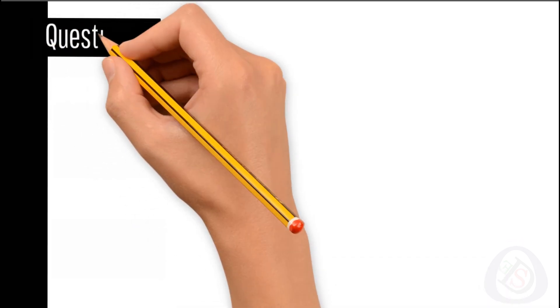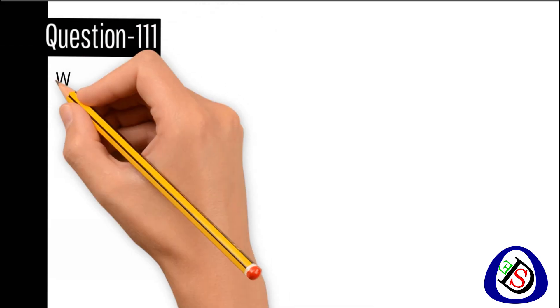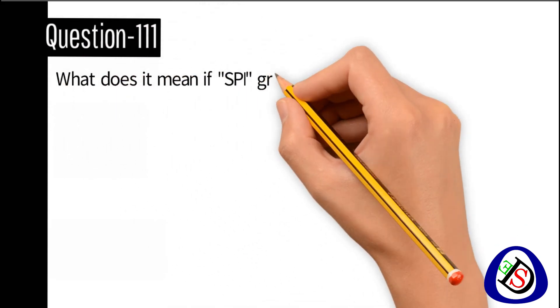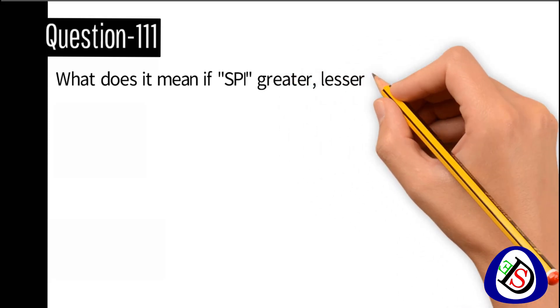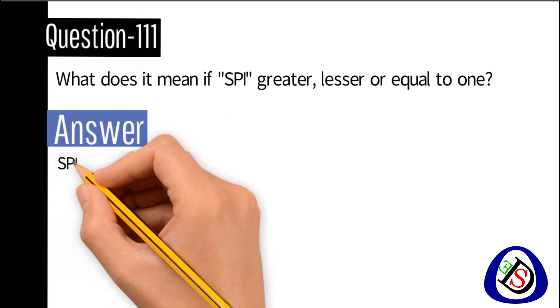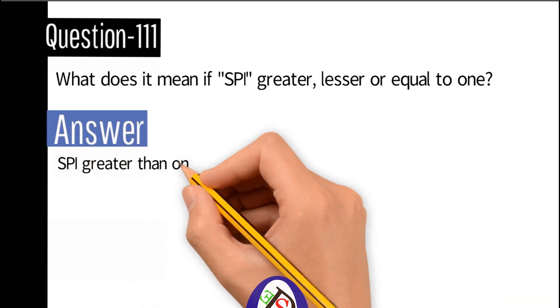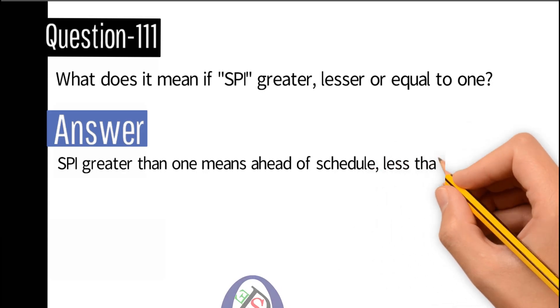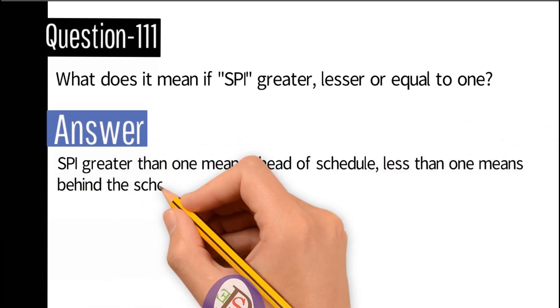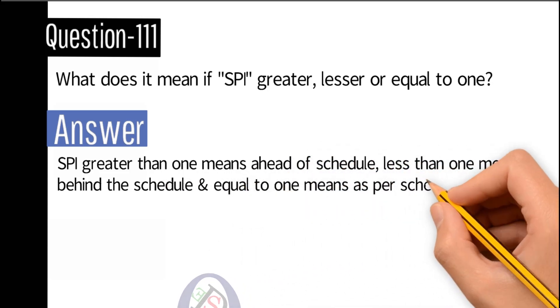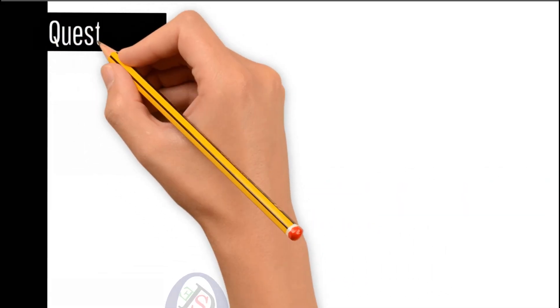Question number 111: What does it mean if SPI is greater, lesser, or equal to 1? Answer: SPI greater than 1 means ahead of schedule, less than 1 means behind schedule, and equal to 1 means as per schedule.